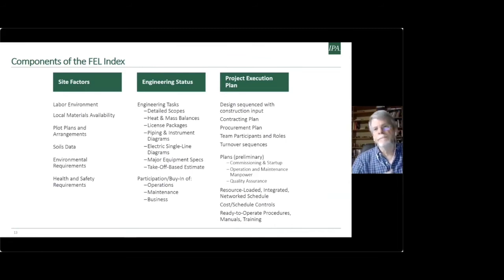And then finally, project execution planning. To what extent have we completed our contracting strategy procurement plan, turnover sequencing planning, our commissioning and startup planning, and have we built a critical path, resource loaded schedule, developed a bottoms up type of cost estimate, and really have initiated the ready to operate operational readiness type of programs? So we have criteria for each of these that goes into a scoring mechanism to determine a front end loading index or score.